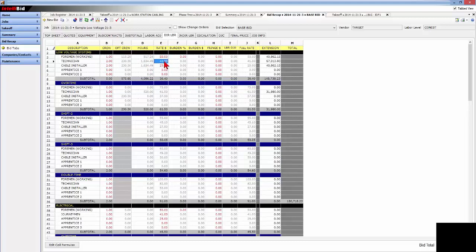But first, instead of a $41 an hour rate, it shows a $36 and $40 rate, and so it drops the labor rate down to $148,700. So a number of $1,000s off this, which can make yourself more competitive and provide some what-if scenarios of how far you need to go based on the market.